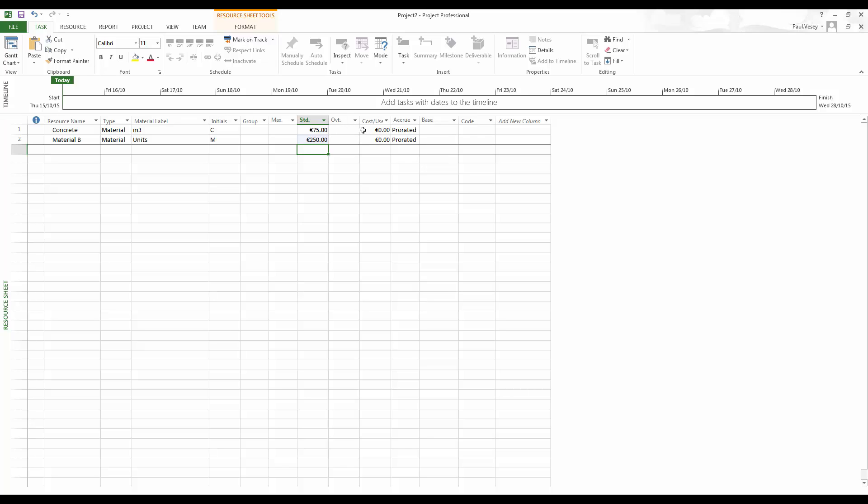Now, overtime rates and things like that don't come into it, obviously, because they're materials. So there we have concrete and material B. So one of them is in meters cubed, the other one is in units.